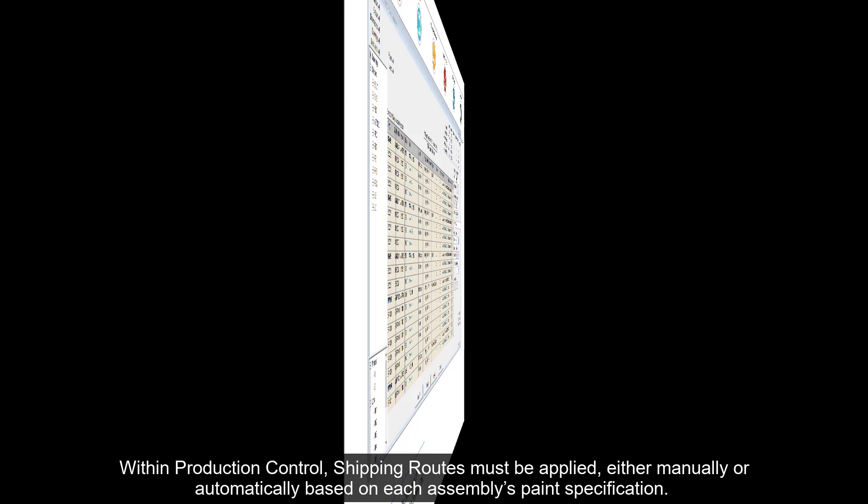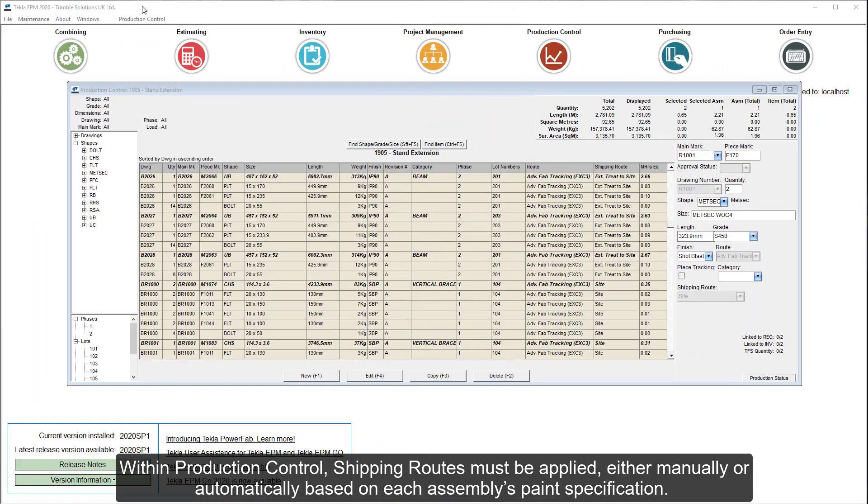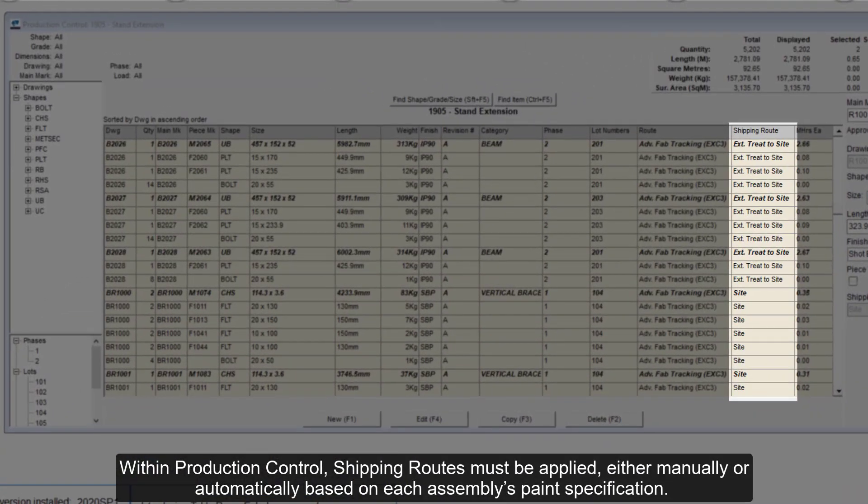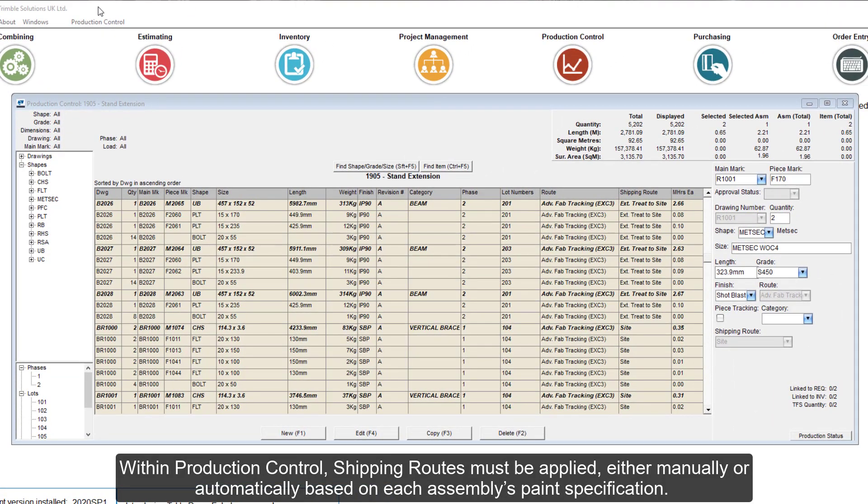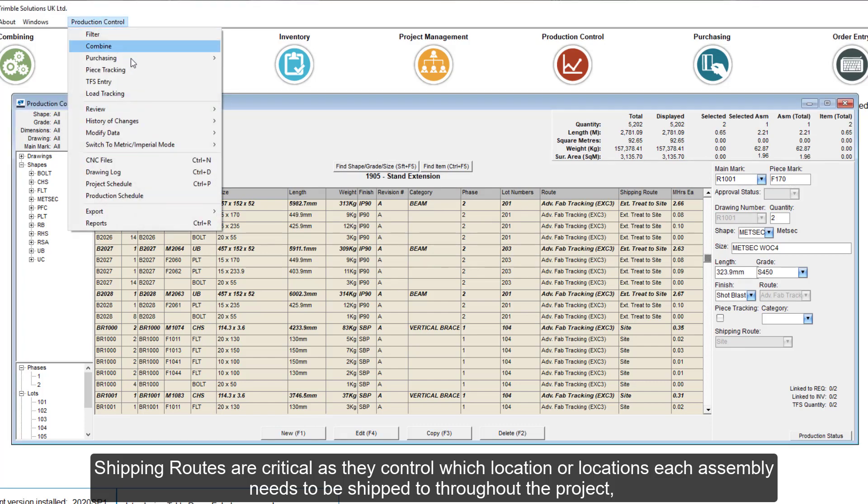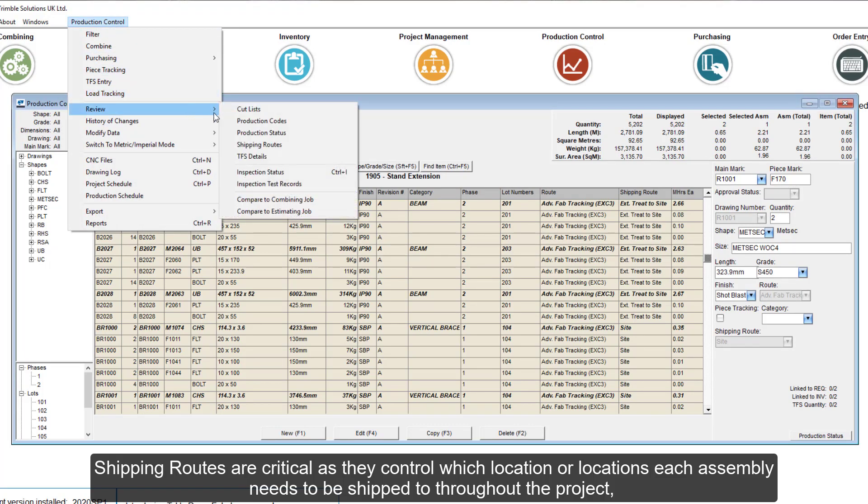Within production control, shipping routes must be applied, either manually or automatically based on each assembly's paint specification. Shipping routes are critical as they control which location or locations each assembly needs to be shipped to throughout the project.